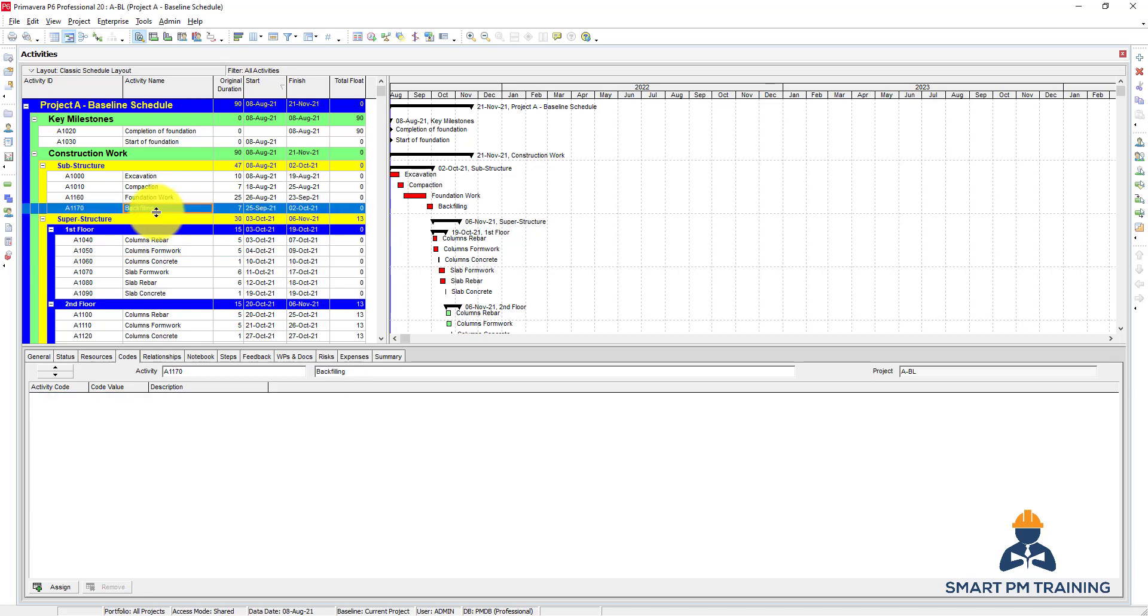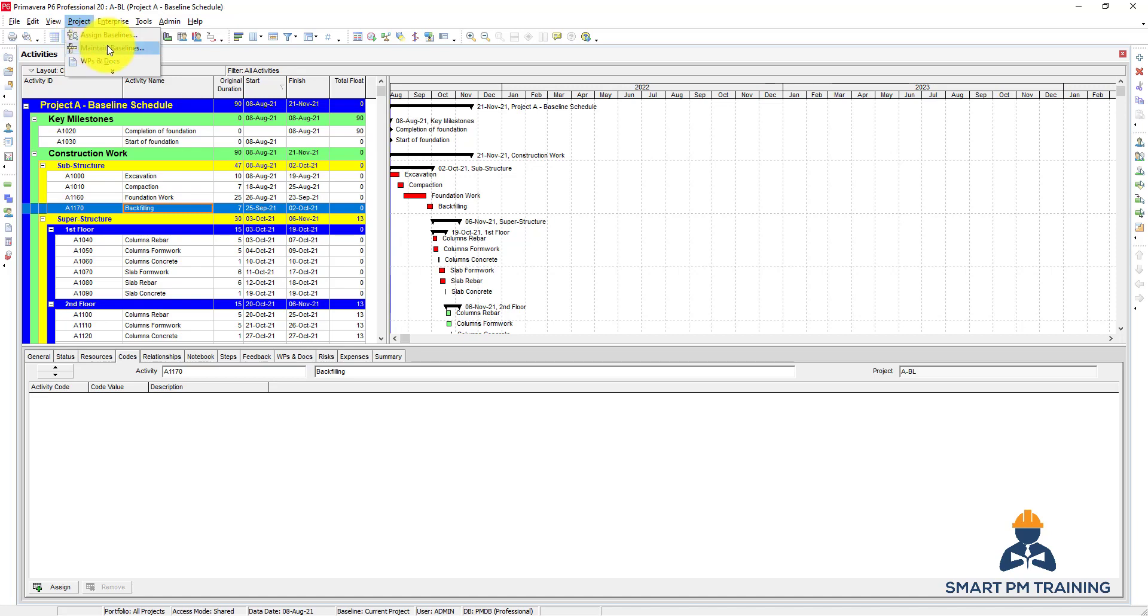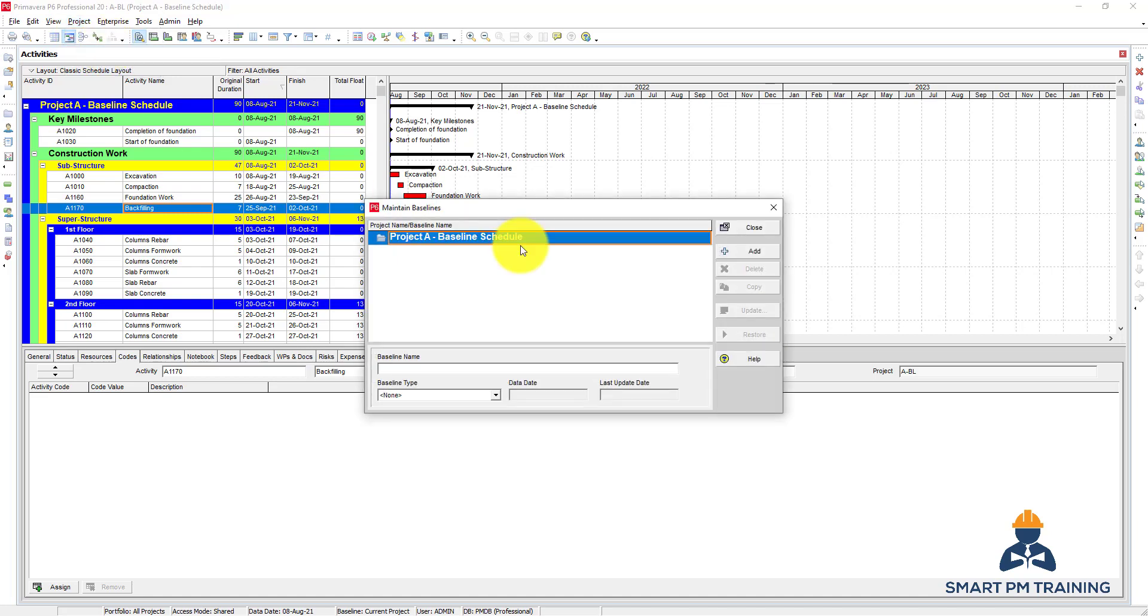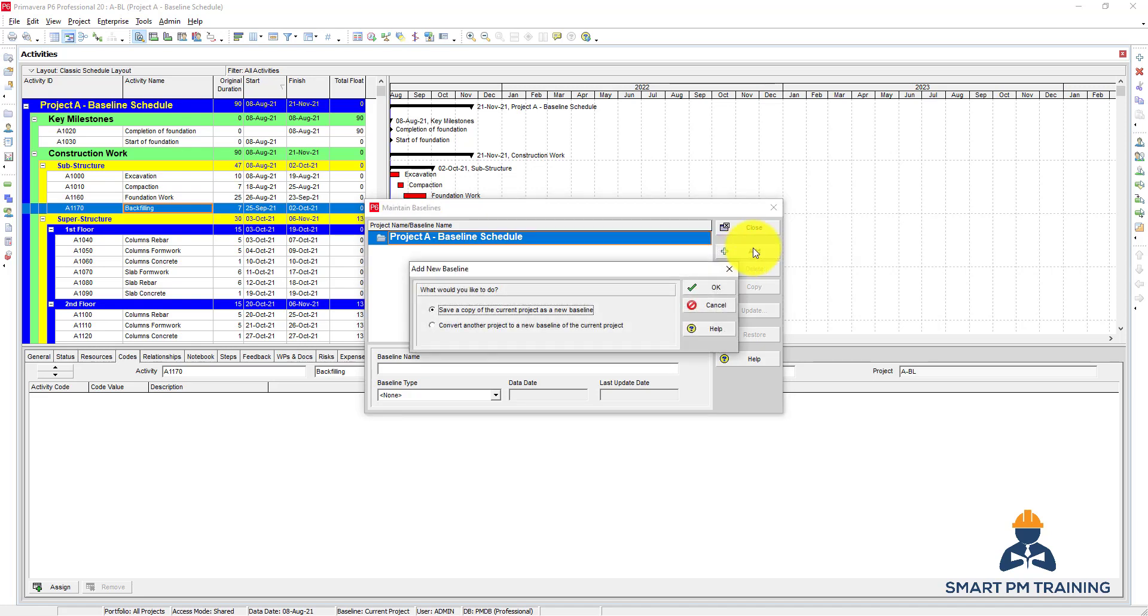To do the comparison with the baseline, I can go to Project and first Maintain Baseline. You do not have any baseline assigned yet. Before you do your update, you can click Add. It will ask you if you want to save a copy of the current project as a new baseline. Click OK.